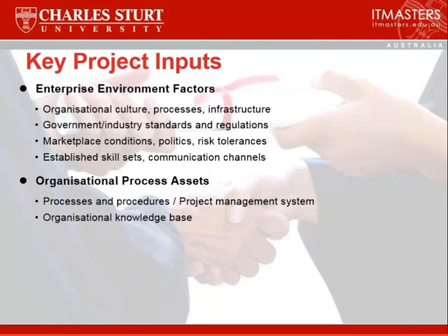The first one is enterprise environmental factors. There are so many factors that affect a project that are outside the bubble of the project itself. It could be the culture of the organization you're working in, their processes, their infrastructure. It could be the government outside the organization completely, government standards and regulations. It could be the marketplace, established skill sets, communication channels. All these things could affect the way you're able to run your project. They're essentially outside the project, but they have an influence on it.